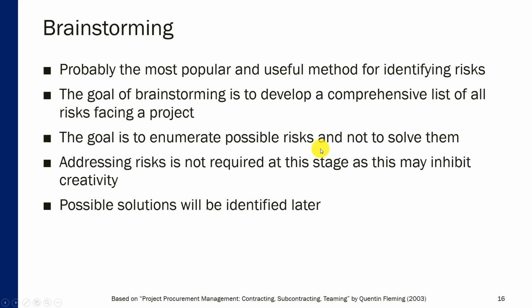And trying to address risk can stop this creativity, can stop this free flow of information and ideas, and basically eliminate usefulness of this brainstorming technique. So addressing risks is not required, as this may inhibit creativity. Possible solutions to potential risks that you identify can be created later.